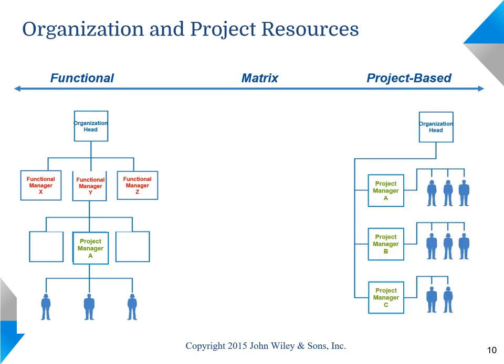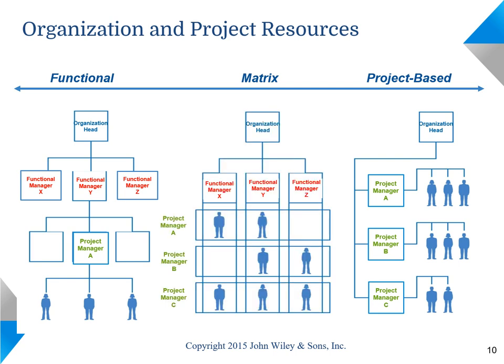On the other end of the spectrum, we have a project-based organization, where project managers report to the head of the organization. Many organizations are somewhere in between as a matrix organization. In this organization, projects are formed across functions, and project managers as well as functional managers report to the organization head.